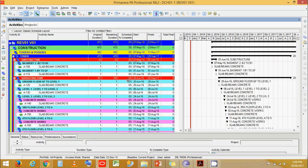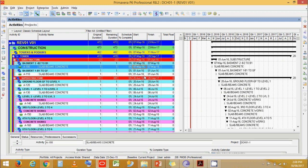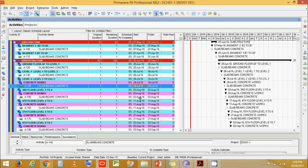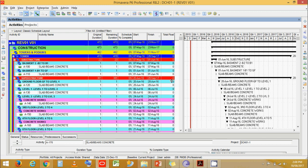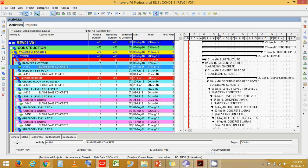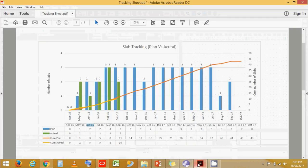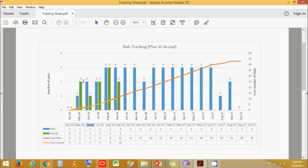Say for example someone asks you how many slabs have you planned in every month, or how many slabs have you actually cast in every month. What we have to do is go to individual slab casting dates and count every slab coming in every month. In May we have one slab, in June we have two, in July we have two, in August we have three and so on. For actuals we would have to do the same. So we need to make a simple format for everyone to understand easily. As a result we'll prepare this chart, which represents the number of slabs planned for every month, the cumulative planned numbers, and also actuals and the cumulative actuals.